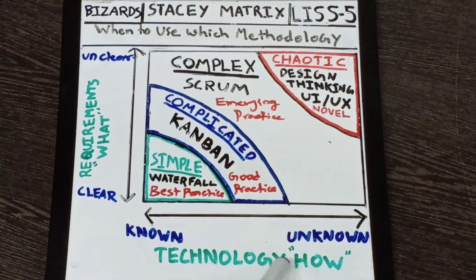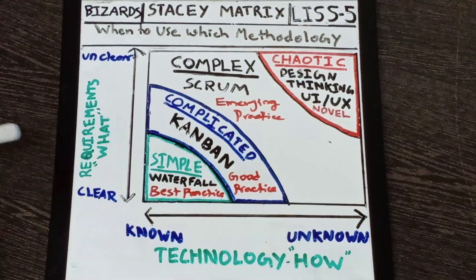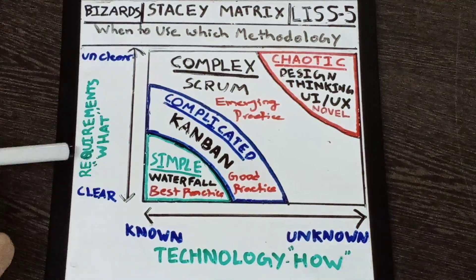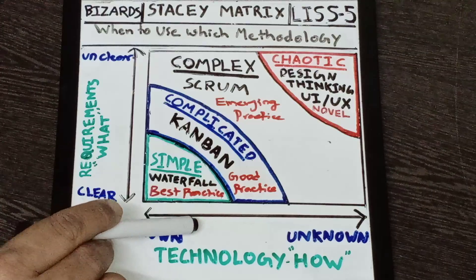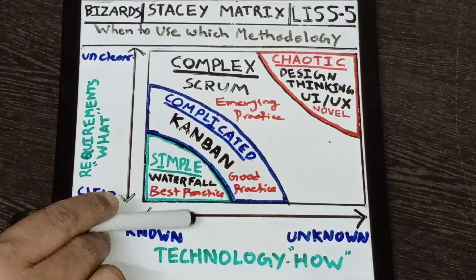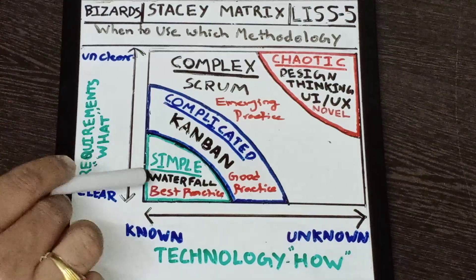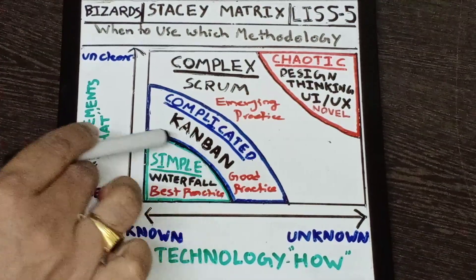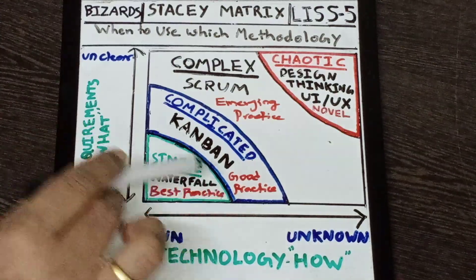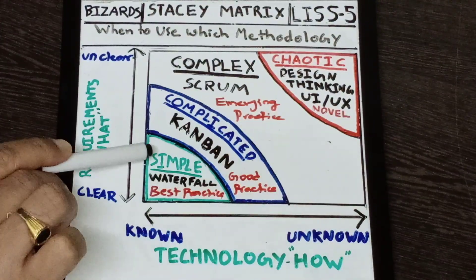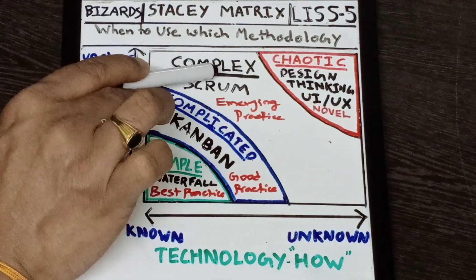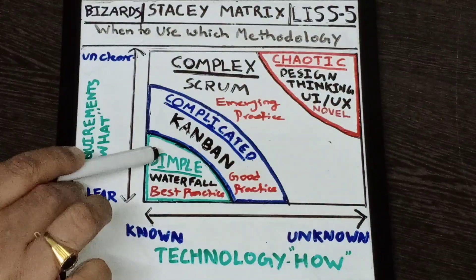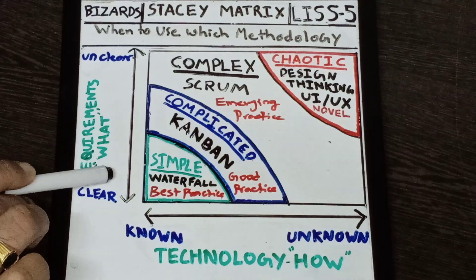When you are working on a project where you know your requirements very clearly — you know what exactly the customer wants — and you also know the technology of the solution, when both are very clear and known, we call this the simple zone. Stacy divides the entire region into four zones: simple, complicated, complex, and chaotic.